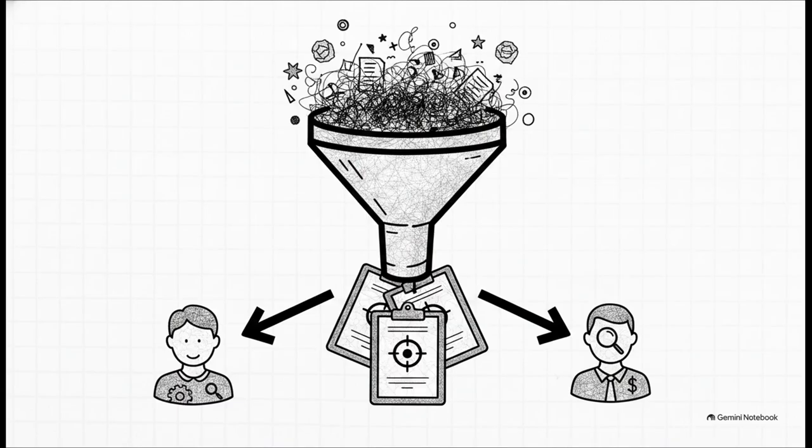Okay, step 4 is specifying information. And honestly, this is what prevents total chaos. You need to outline exactly what information is needed by each department, how urgent and frequent it should be, the appropriate process to relay it, and the specific situations where this process even applies. Doing this ensures the right details hit the right desks exactly when they're needed.